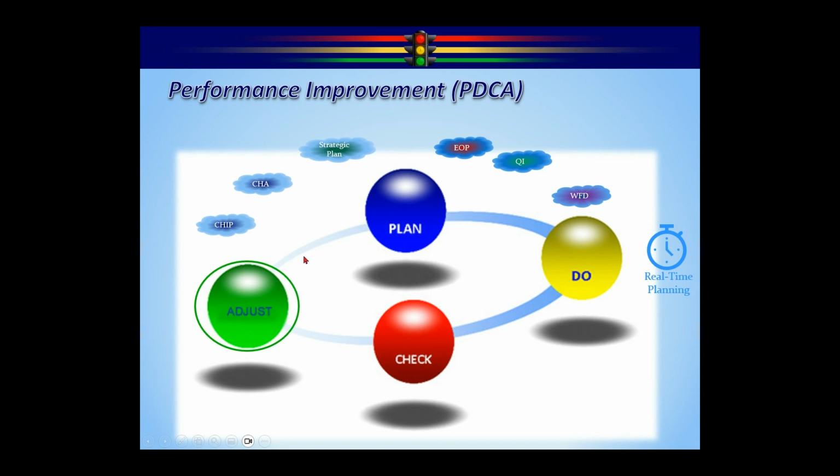Maybe it's still at 21%, but we believe that if we threw a little bit more resource at it, we could get it to 25. So the resources we had were the training sessions. So maybe we go from 9 to 12 training sessions a month, if you think that would help. Maybe there's more tobacco vendors out there that we need to contact. So the possibility is to throw more resources at it to get to that 25%. Maybe there's a whole other activity we haven't thought of to be able to go out there and do that.